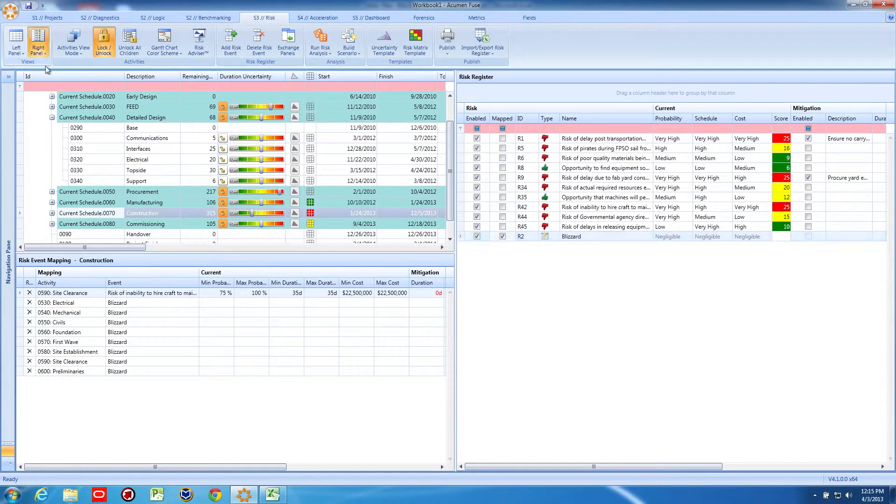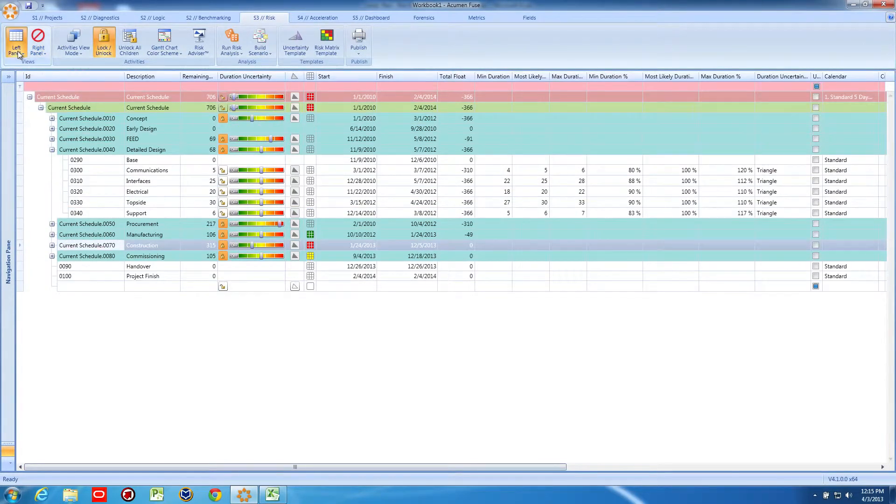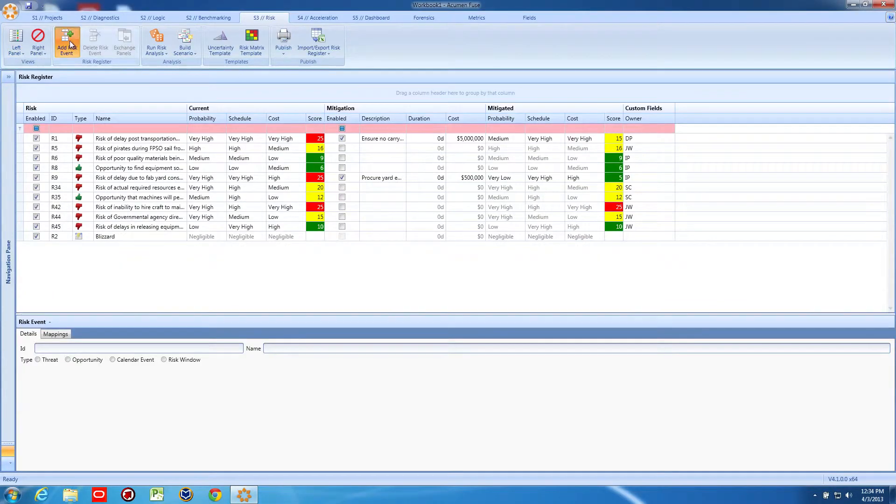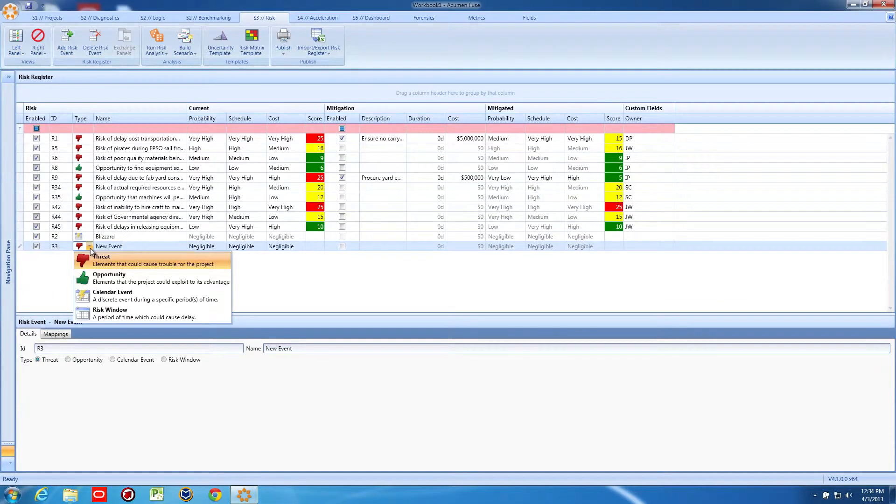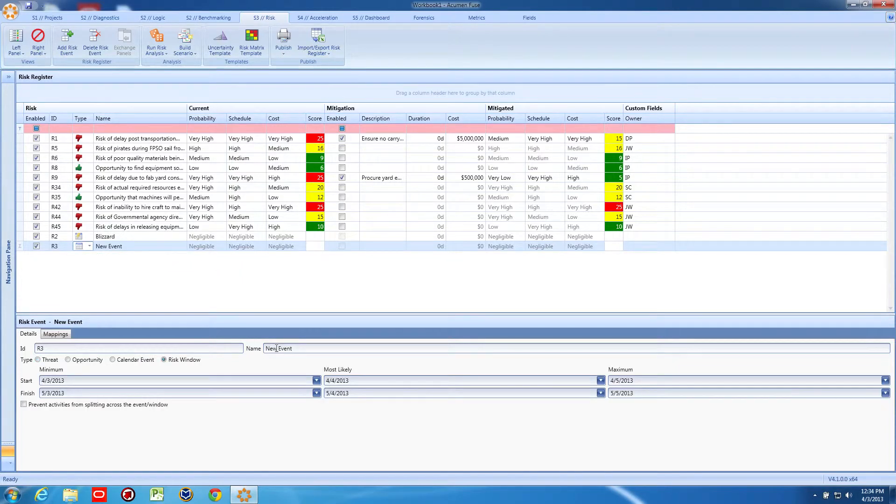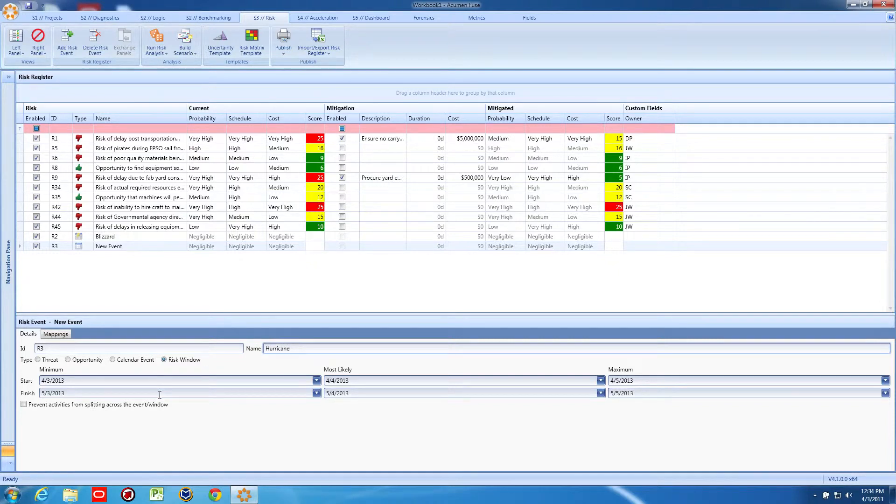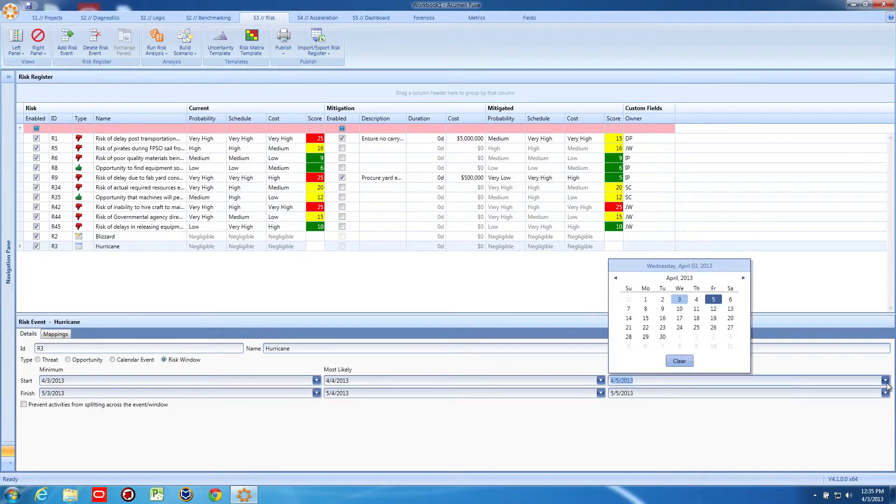Now, let's add a slightly different type of risk. This will be a risk window. Ours will be a hurricane. Here we have the ability to apply a three-point estimate of the event start and the event finish. For a highly variable event, we can spread the dates across a wide range, but for an event that we're more certain of, we can narrow the range of start dates and finish dates. Now, I'll enter some dates into the hurricane risk event.